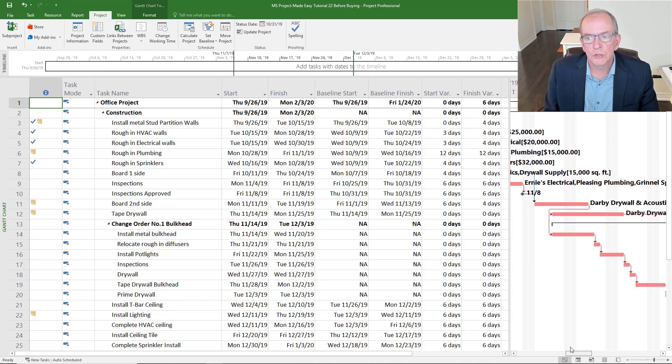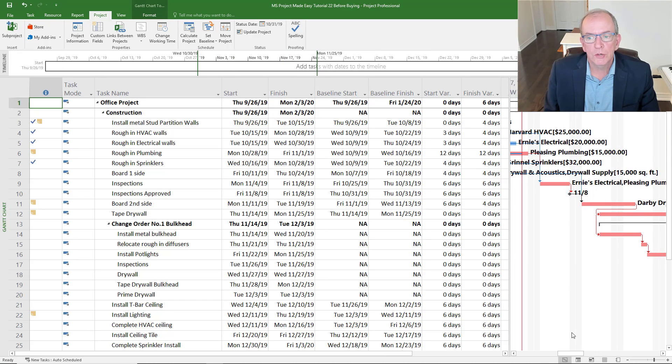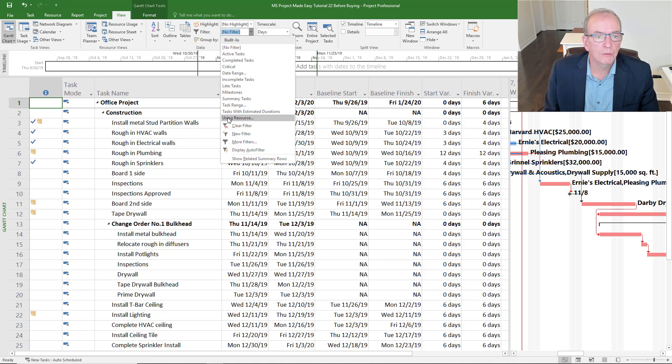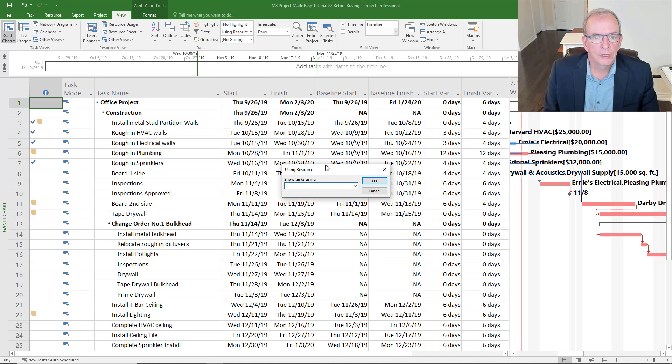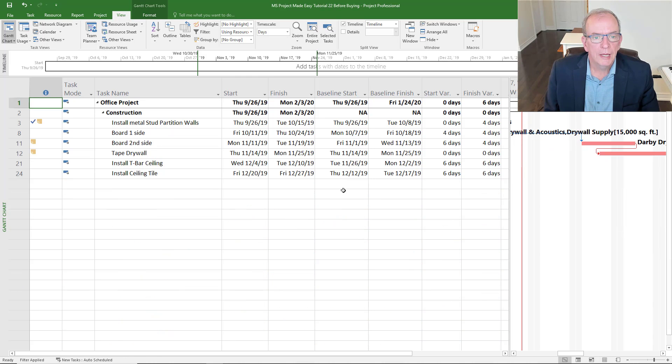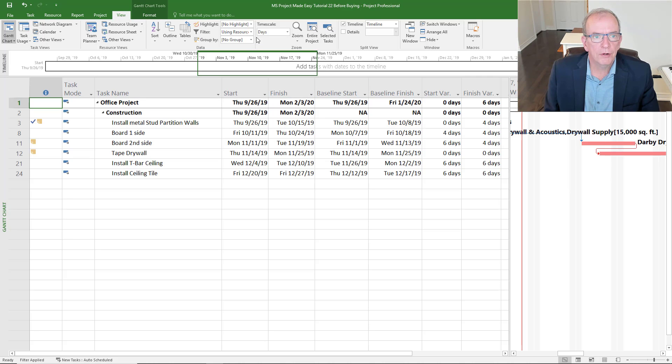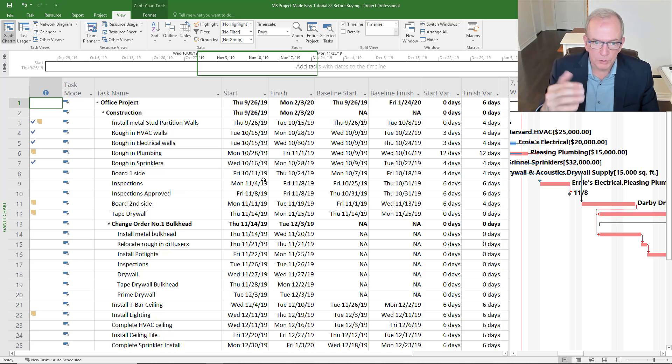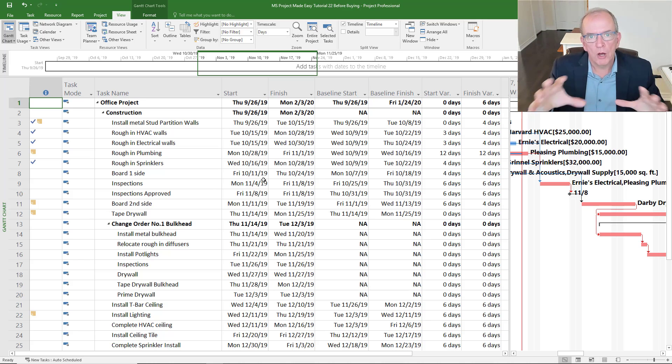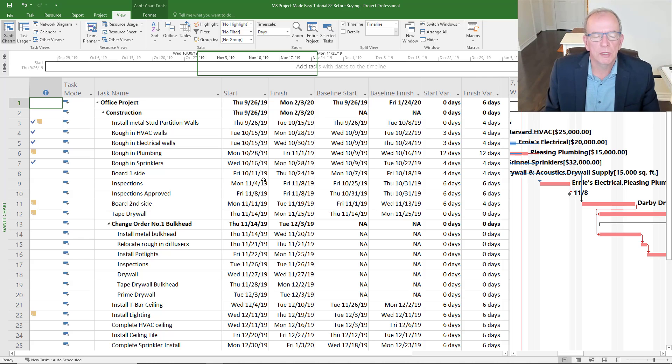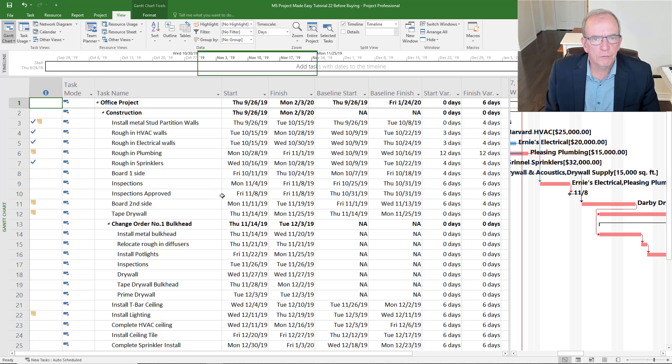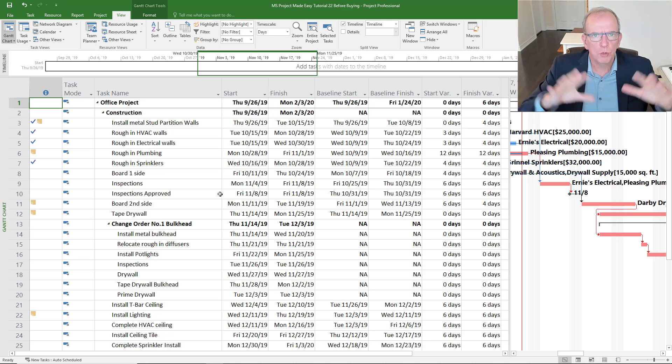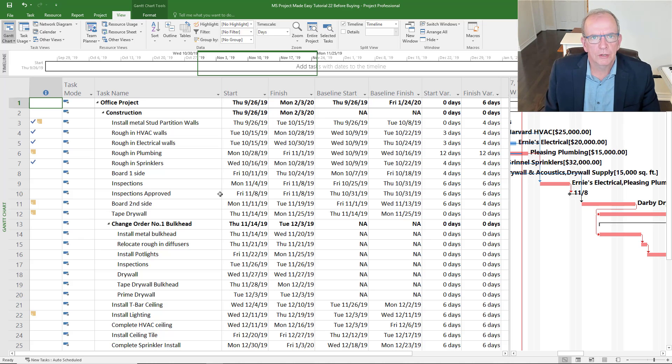There's all this kind of data that you can collect on your project. If you've assigned resources to a project, you can actually filter information on your project. You can go to the view tab and go to filter. You can filter by resource, pick your resource that you want to filter by, click OK, and then it just shows you the information of that particular resource. Very handy on projects where you want to just deal with a particular topic. Maybe you've got that subcontractor or trade partner coming over and you want to just look at their dates and discuss it with them. Scheduling software is a very powerful tool to think about if you're still using spreadsheets.